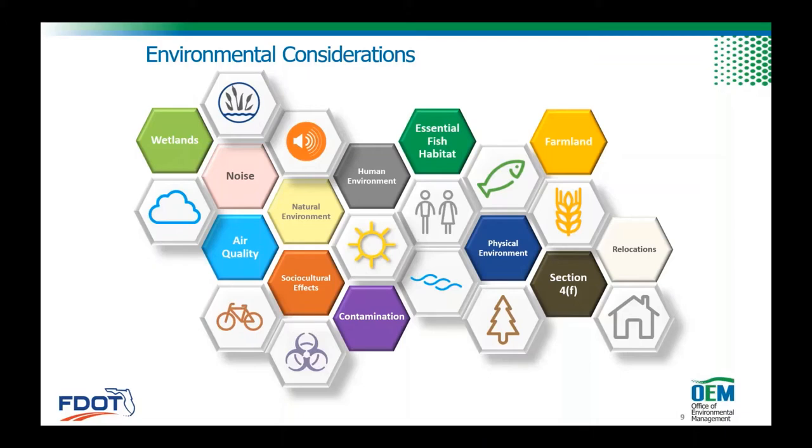So in those agreements with those ETAD agencies, we actually map out and identify what are their authorities that their agency works under, and we map that to issues or topic areas within ETDM and the environmental screening tool, so that we can make sure that their agency actually provides us comments relative to their jurisdiction and authority on that proposed project and/or alternatives that get released.